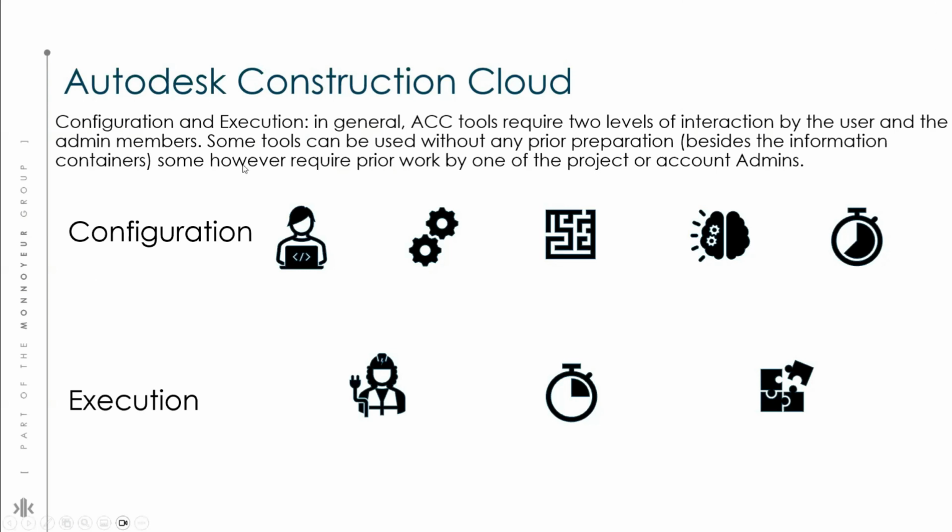Now, that time that is invested in this configuration is going to pay back with the execution. That means that if you spend an hour configuring something, that hour might save you 10, 20 hours of time when you are executing it. So keep that in mind, because later on, when we work in the mobile app, we are expecting the configuration to be finished. That means the mobile app is not for configuration, it's only for execution. The mobile app is going to be for people to be on the site, to be working directly in the field, to be collecting data from the field. They are not going to be expected to be working on any type of configuration for the project.